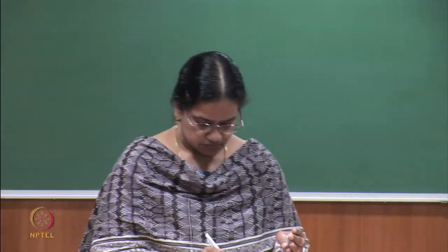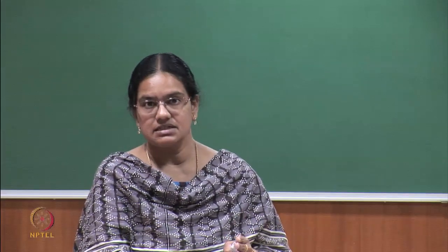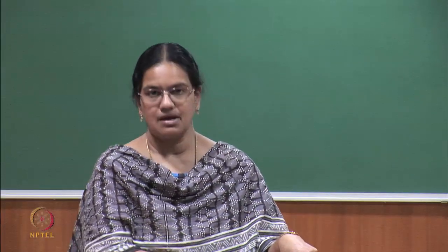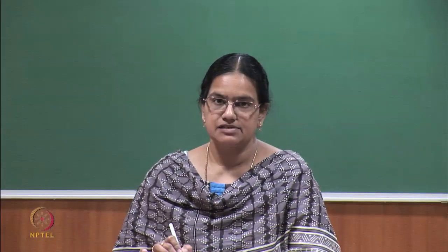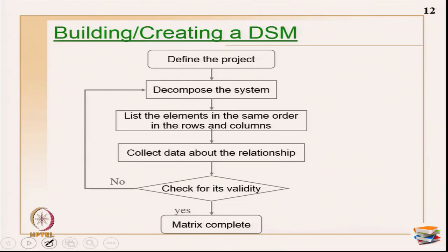So far, we started with defining the scope of the project, then decomposing the project, where I have shown you the levels: teams, components, then activity list, and then the variable DSMs, or the other name, a DMM, which is a domain mapping matrix, and I am having 2 rectangular matrices. Then you have to multiply, if you want to do it mechanically, or you can go through the logic also, as I have explained. You do that and then you get this matrix, convert it into X marks so that you get the activity DSM, which is what I have shown.